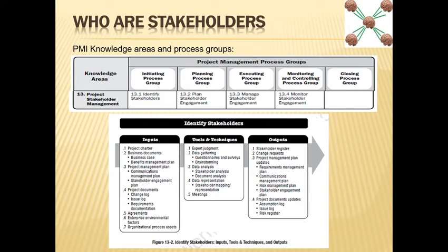Then you should do some further data gathering. This can be based on questionnaires or surveys, or you can have a brainstorming session with your team. For example, if you want to run a big project in some area and all of the residents of that area are your stakeholders, and you need some feedback from them, you can only get that feedback through some questionnaire or surveys, and then you can brainstorm with your team and gather further data.